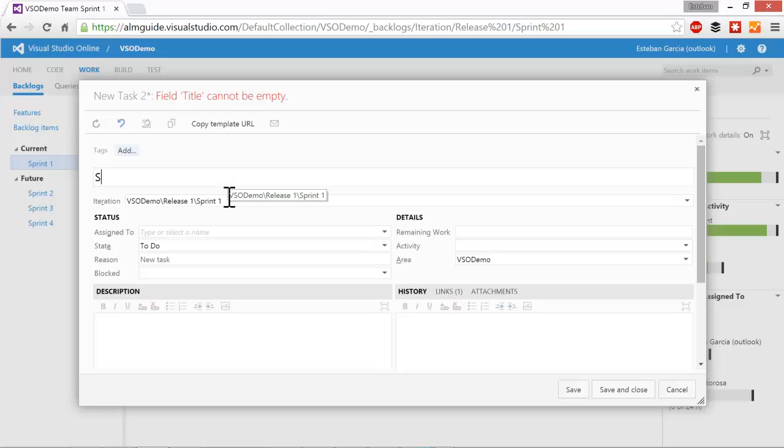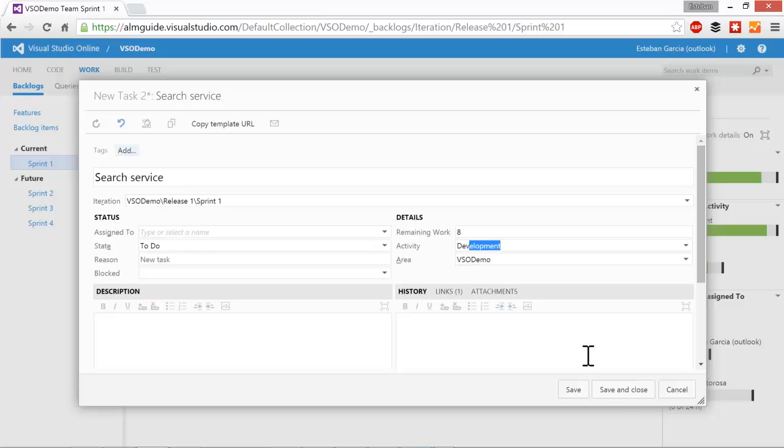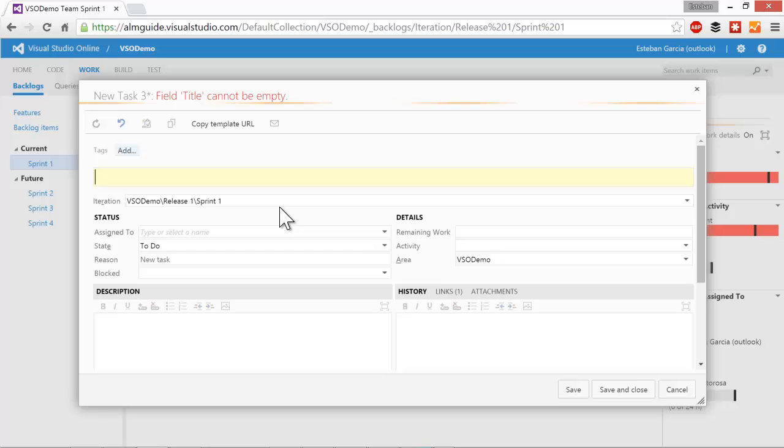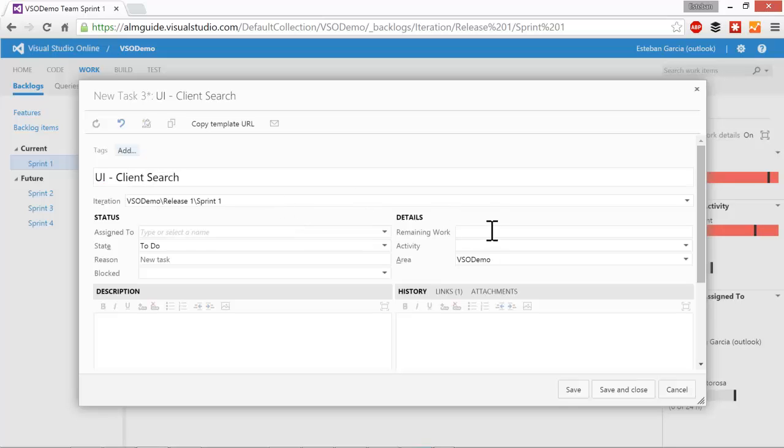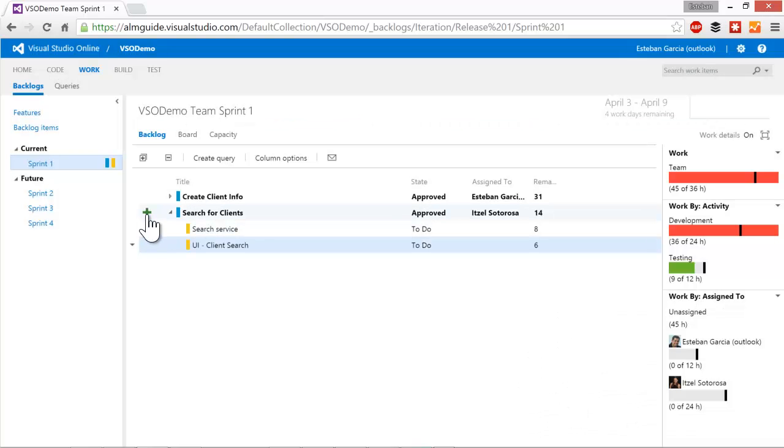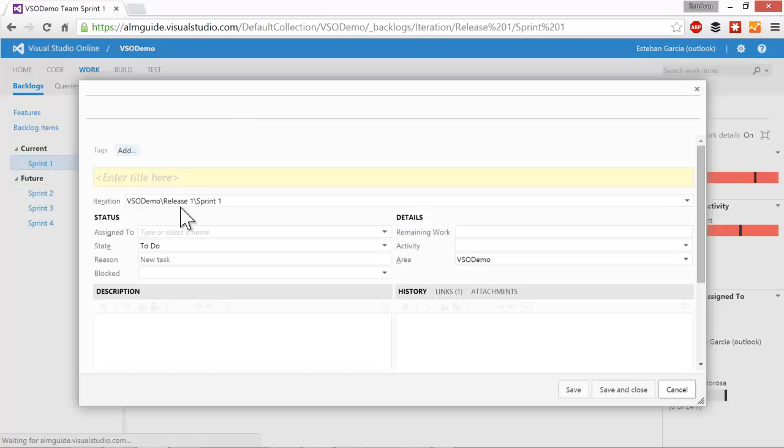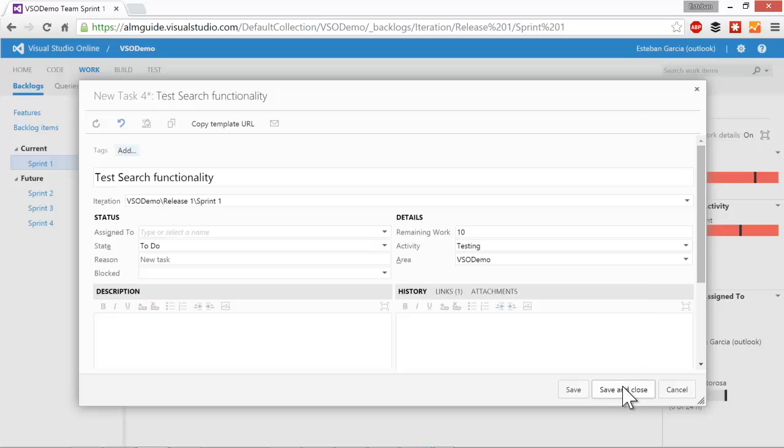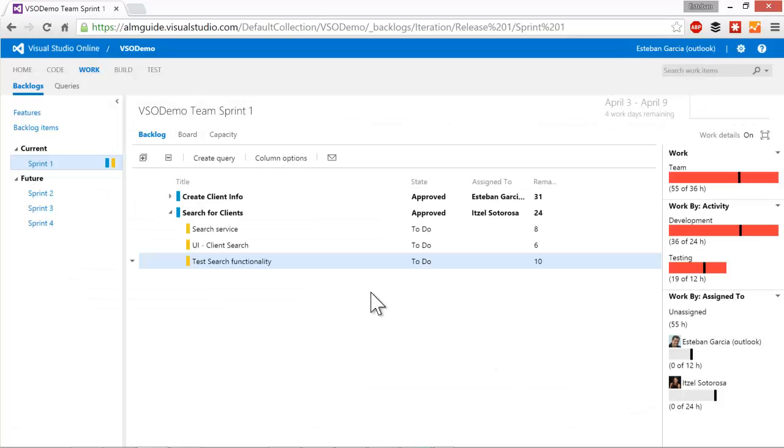I'm going to have a search service. And that's maybe going to take me eight hours of work. I'm also going to have a UI change task. And that might take maybe six hours. And finally, of course, we need to do some testing. We're going to do quite a bit of work around there. So we're going to say that this is 10 hours of testing and mark it as a testing task, of course. Save and close. As you can see, as I was adding these tasks, we saw that our development and testing buckets got overflowed. We don't have enough capacity to be able to do all the work.